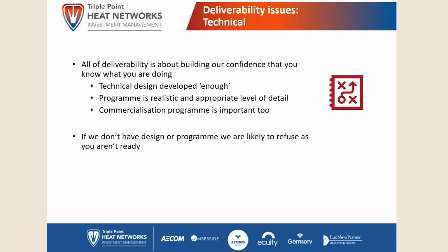Construction program. Clearly, if you are at construction stage, then we would expect you to have quite a good construction program, and again, sometimes this is subject to a D&B, so a D&B contractor will provide you with the very detailed program, but you should really have a good idea of the main construction phases at the very least.